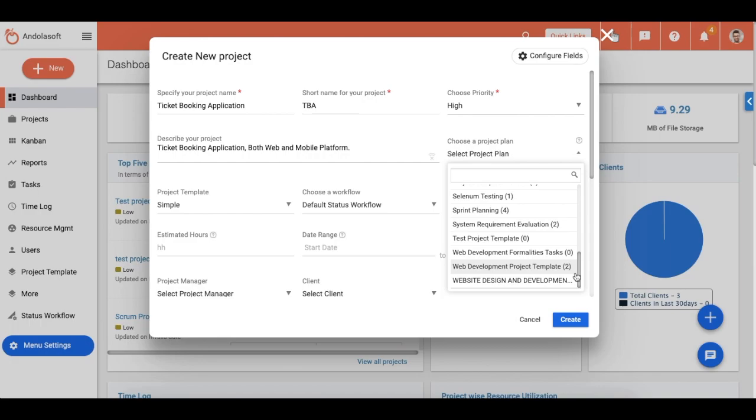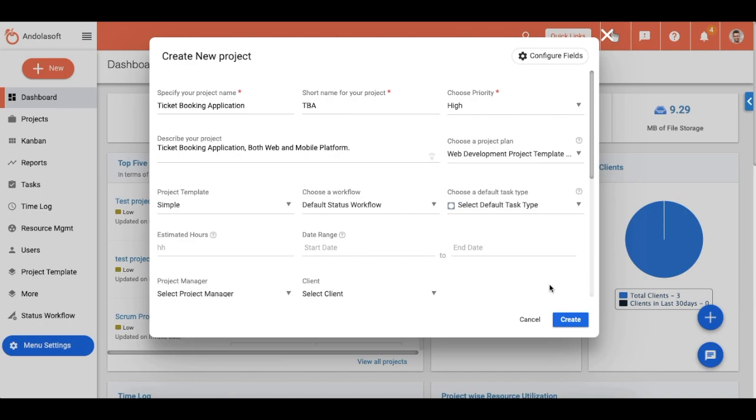So the next time you have a project, just select the specific web development project plan from the dropdown. And when you click on Create at the bottom of the create project form, all task groups, tasks, and subtasks will be automatically created, so you prevent repetitive manual task creation efforts.